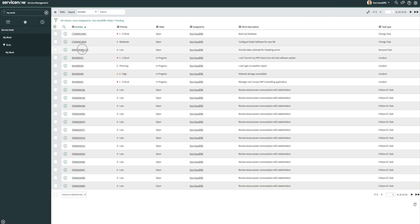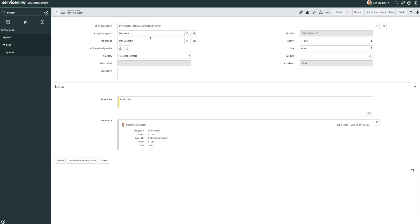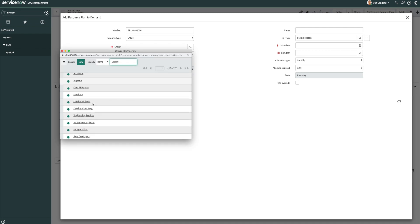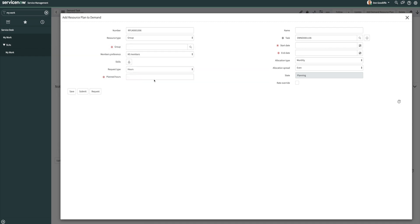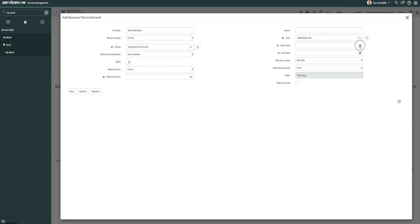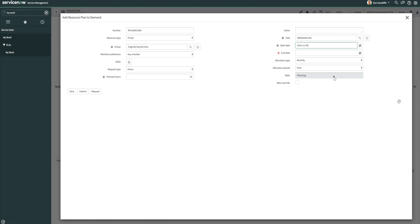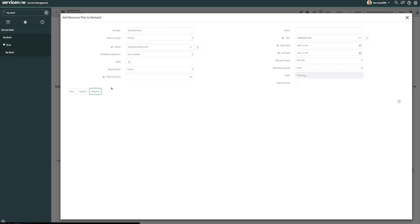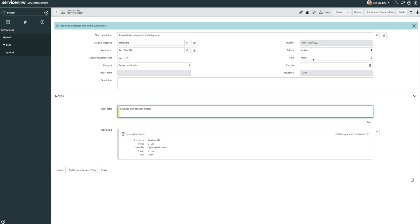So then we go on to the next one, which was estimating the labor for installing that server once we get the server. So let's go ahead and add a resource plan here. So we want to pull someone from engineering services. We really only need one person to do this. And let's say it's going to take them about 20 hours to do the install. And we know it'll take a little bit of time to get the server here, so let's go ahead and estimate we're going to start on November 4th of 2022. And then we can go ahead and request this resource and then we'll close this task.